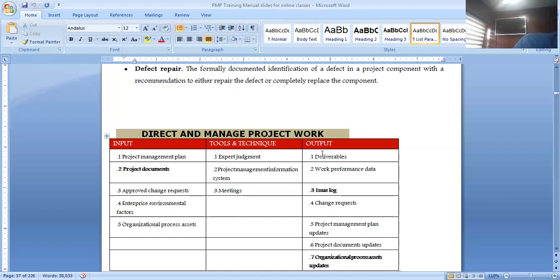I just finished touching this, and now manage project knowledge. We have to talk about manage project knowledge. There's no way we will embark on a project without learning new things. If we talk about alternative analysis, we must learn new things, right? So as we are learning new things, we still have to be managing the things we are learning by archiving them, by writing them somewhere for future use. So the more we do a job, the better we'll become at it. But it's also encouraging that we record that which we have learned on the project.